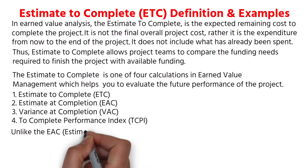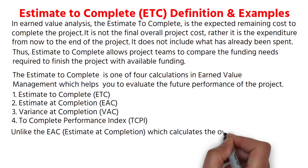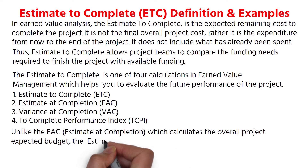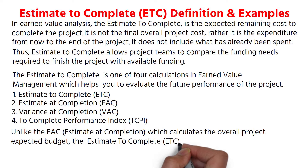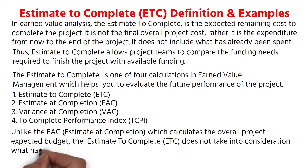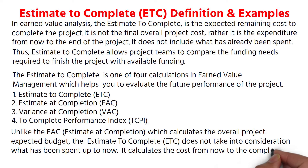Unlike the Estimate at Completion, which calculates the overall project expected budget, the estimate to complete does not take into consideration what has been spent up to now. It calculates the cost from now to the completion of the project.